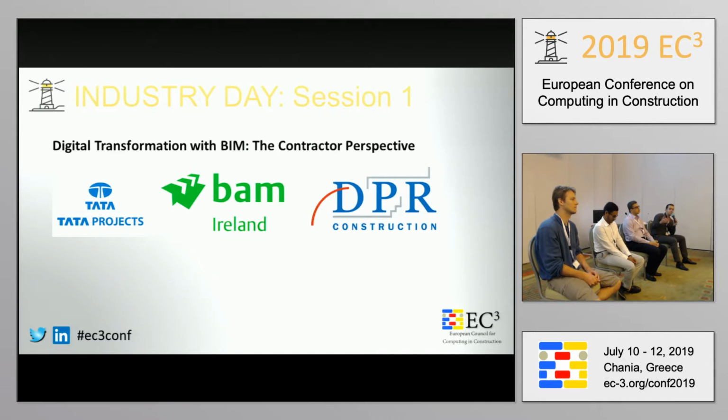And then during the project, we also provide training in all sorts of tools, Revit, Navisworks, any kind of software that is going to be used through the project. But one of the basic requirements would be to have that as a requirement in the contract. So then it kind of forces people, because nowadays everyone is trying to work with BIM. So having it in a contract or a formal way to enforce them is a good way as well.